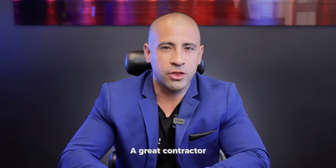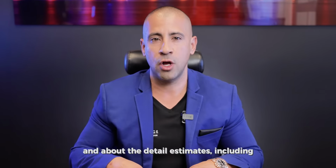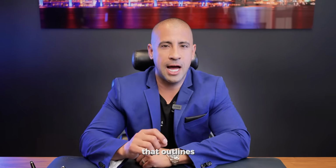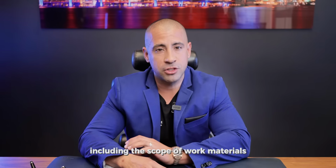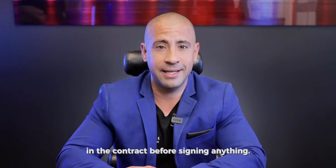A great contractor will be fully transparent about their pricing, about their process, and about the detailed estimates, including all the information that you need. When you choose a contractor, make sure you have a written contract that outlines all the details of the project, including the scope of work, materials to be used, and payment terms. Make sure you understand everything in detail in the contract before signing anything.